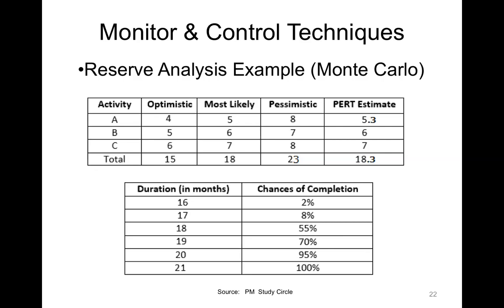Anything in between would determine how many months we need in contingency for this project, depending on how confident we want to be, and balancing that with how much time we actually have available to contribute to those tasks. So we would answer the question not in terms of a static number, but in terms of a confidence level based on the organization or the sponsor or the client and what they're comfortable with.